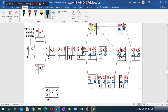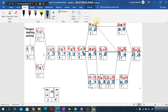For activity F, connected to G, H, and I — lowest value is 14 — so LS = 14, and 14 − 6 = 8. We move 8 to activity E: 8 − 1 = 7. Move 7 to activity D: 7 − 4 = 3. Move 3 to activity C: 3 − 2 = 1. Activities A and B are connected to C, so we distribute LS = 1 to both. A: 1 − 1 = 0. B: 1 − 1 = 0. Both zeros flow back to the project starting node, giving 0 — confirming the backward pass is correct.